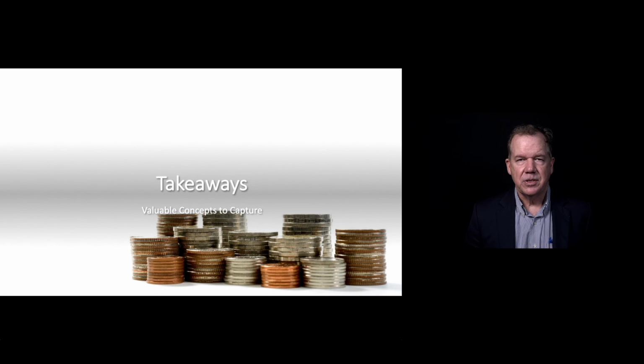One further use is to use these percentages to add this expense to job cost reports, so a clearer picture can be presented. The added portion of G&A amplifies savings or shows cost overruns to their full extent. Indeed, the dual overhead rate method coupled with the job sizing, which I can show in another pod, can help in post-job reviews.